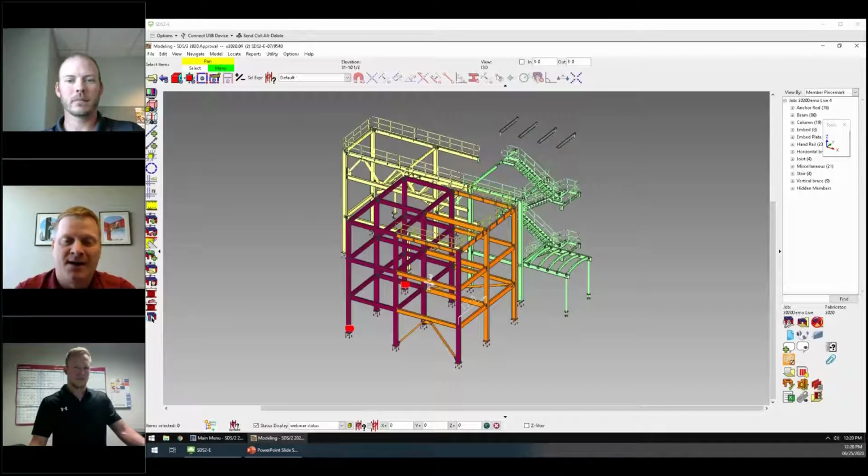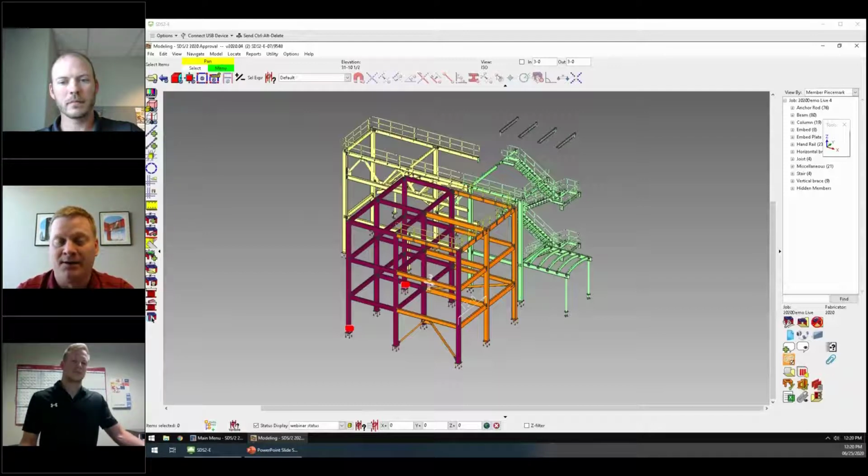Nate mentioned the RFI. The old way was a detailer spending 15 to 20 minutes creating the RFI, writing it down, hoping the engineer is going to understand it and that it's well written. Then it goes to the engineer, hopefully they interpret it right, and you get the answer back. That could be 2 weeks. With this system, and I know what other people have done, it's: I've got a couple questions, let's log in together at this time and just review the model. It can save a lot of time and energy on both sides to really get that project out the door and reduce those timelines.